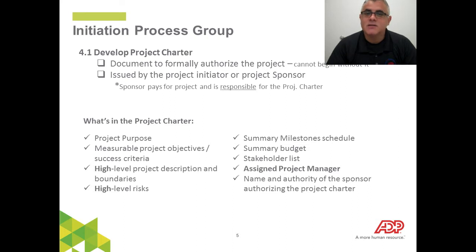Some of the things that go into the project charter would be, for example, a business case. This is what's going to tell everybody the purpose of the project. You'll have to do things like get information from your client, or do some research, maybe look at historical information from projects that have already been completed to help guide you to build out this project charter. A couple of things about the project charter: it's required, and it's going to authorize your project.